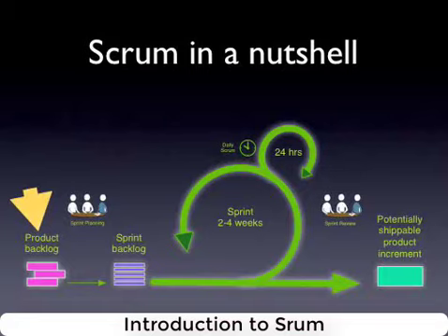So the most important stuff has to be on top and the least important on the bottom. And this is primarily the product owner's job, though the team is supposed to help the product owner by estimating the tasks, so that the product owner can know how many difficult tasks are on the top, bottom, or whatever.